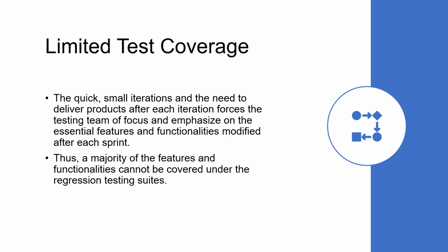However, for the proper integration testing of all the user stories which are combined into a single feature or epic, what teams and organizations usually do is dedicate the last sprint before the release to integration testing and UAT testing. So the complete end-to-end testing of what we have developed in the development environment is going to be tested in the UAT environment. So at least before rolling it out to production, to the actual users, people might be aware that everything is working fine.